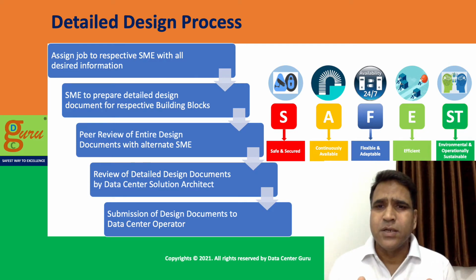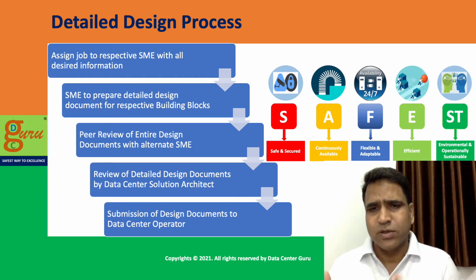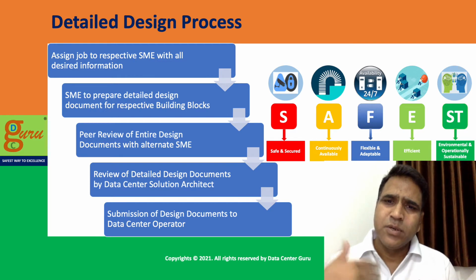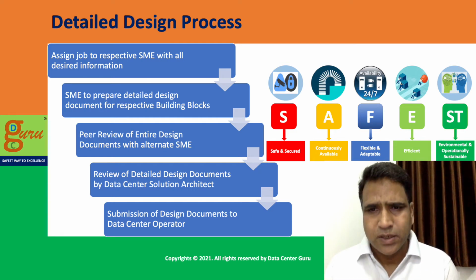That's the reason in a normal BPO kind of setup, there is a concept called maker and checker. So the peer review process is nothing but maker and checker. One SME is designing, and another SME has to see and peer review the entire design to ensure that each and everything is intact.